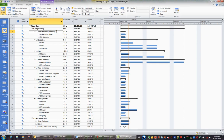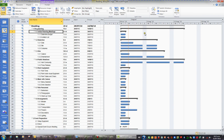When we enter a task into a project plan, we want that task to abide by the project calendar. And if we say that the project calendar has Sunday as a non-working day, we want the task to acknowledge that. Sometimes these are called standard durations, and they all abide by the project calendar, and we don't work Sundays.